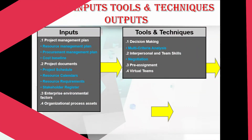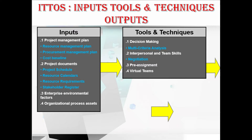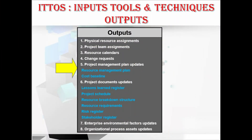In the inputs, we have the project management plan — consisting of the resource management plan, procurement management plan, and cost baseline — and the project documents: project schedule, resource calendars, resource requirements, and stakeholder register, plus enterprise environmental factors and organizational process assets. For tools and techniques, we have decision making (multi-criteria analysis), interpersonal and team skills (negotiation), pre-assignment, and virtual teams.